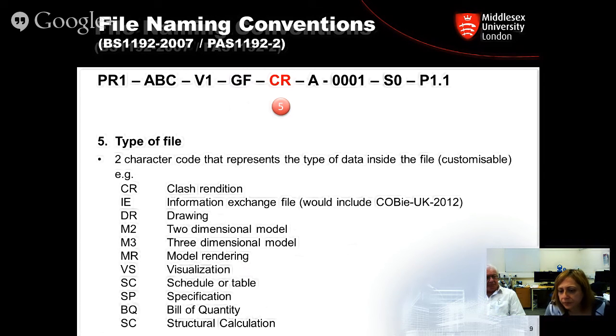Yeah, exactly. From the owner's perspective, if the designer and contractor have their own standards, how can we force them to use our standards? You can't force anyone if it's not designated or decided on right from the start, Mohammed. It has to be part of the EIR and the BEP. Without that, there's not going to be proper coordination between everybody. The people have to talk all the time. They have to have that specified or written right from the start. But to force your standards on them later on will require a lot of negotiations.